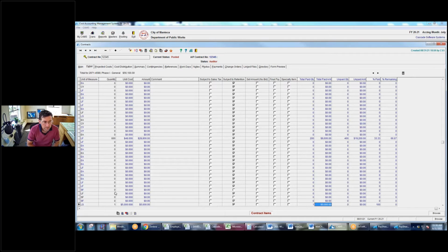But in my experience, the contractor has to agree to that, and you might bump up certain line items and not others, so it starts to turn into a change order basically.